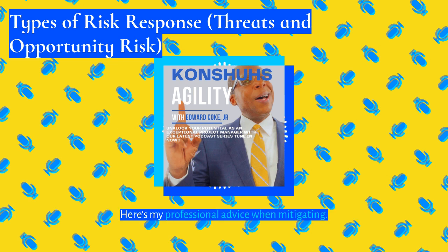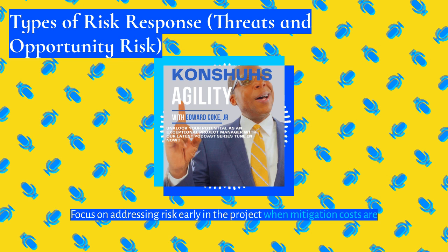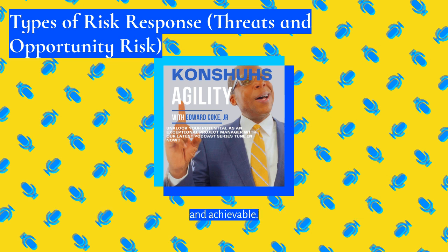Here's my professional advice: when mitigating, assess the cost-benefit ratio of mitigation efforts to ensure the approach is efficient. Focus on addressing risk early in the project when mitigation costs are lower. Document your mitigation plans in detail and ensure they're realistic and achievable. That's the key, those two words: realistic and achievable.